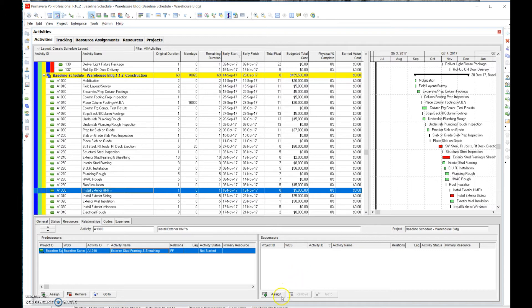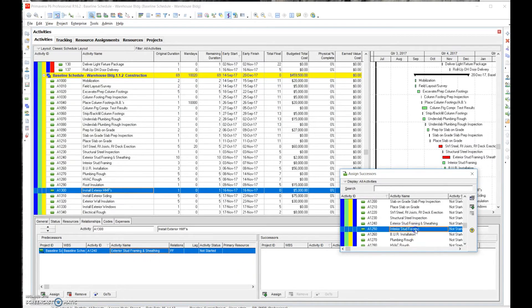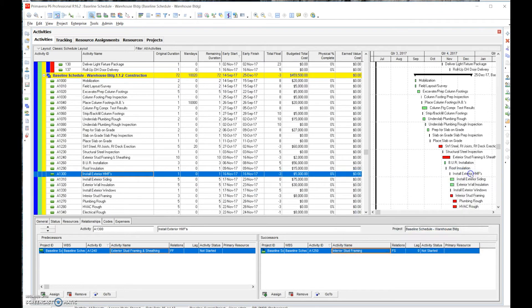But we now have an open network — we don't want that. So we're going to go ahead and add back in a successor. You see here, I was trying to click on the same activity that has a predecessor and it won't let me. It kind of helps you stay out of trouble — sometimes you'll double click and you're like, 'ah, that doesn't make sense.'